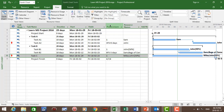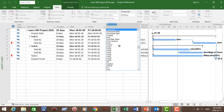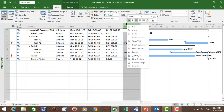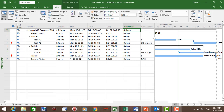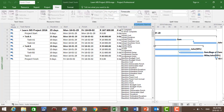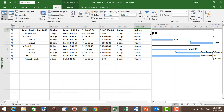Now let's insert the cost column. Right-click in the header column, choose Insert Column, type CO, and choose Cost — there we have our cost column inserted. To insert Total Slack and Free Slack: right-click again, Insert Column, type TO, and choose Total Slack — that's our total slack column, showing which tasks have float. Right-click again, Insert Column, type FR, and choose Free Slack — that's our free slack column.